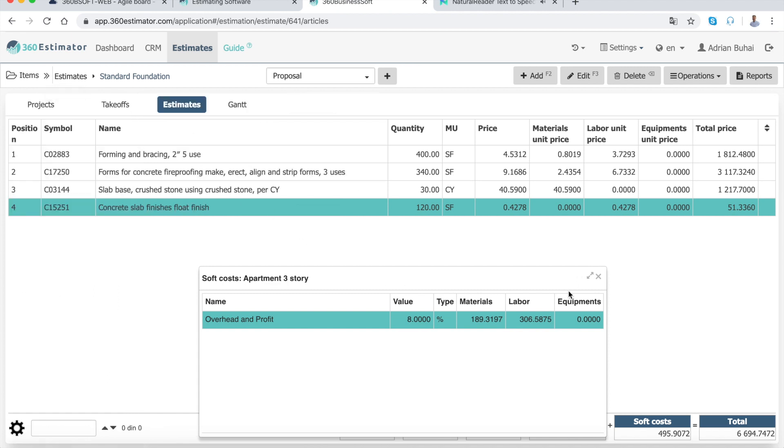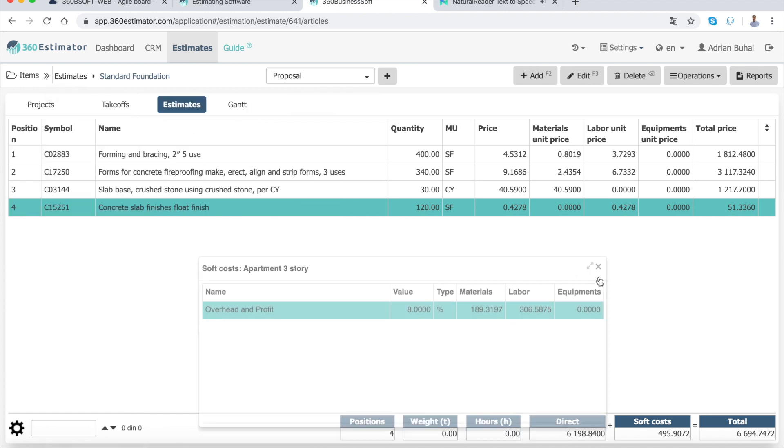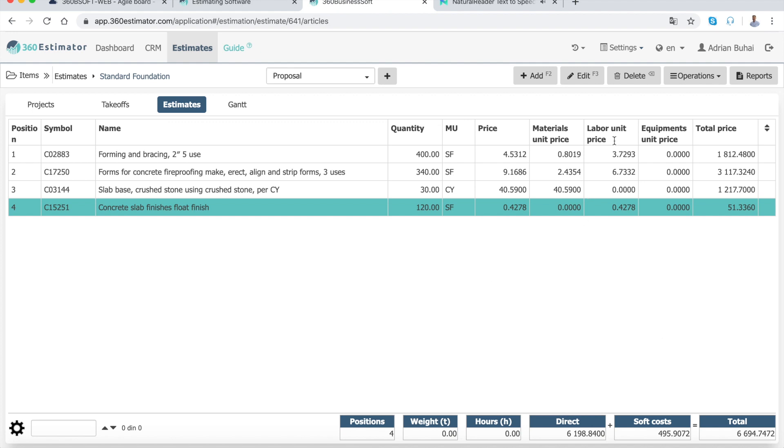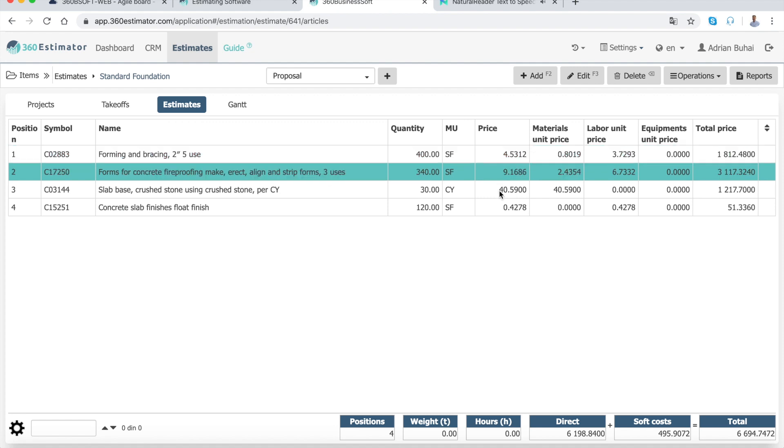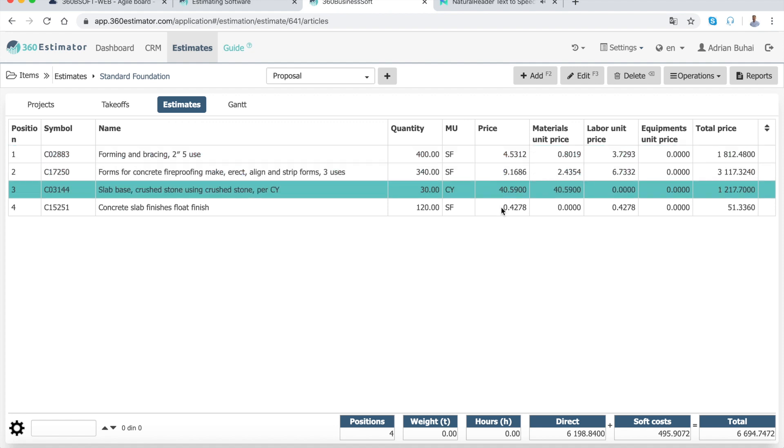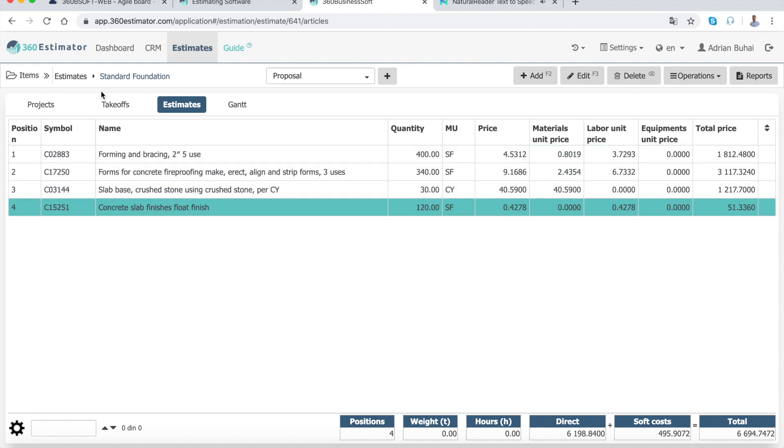Profits are what's left from what you were paid after you've subtracted your overhead and the costs of the construction. Estimates are the basic unit of a project and are created using cost lines, unit items, or assemblies.